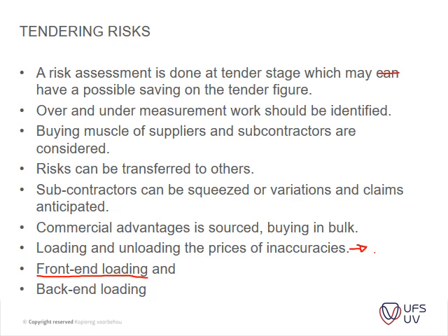So please note that this is a very risky item, and the QSs usually pick it up when you do your leveling of your rates before you get appointed.